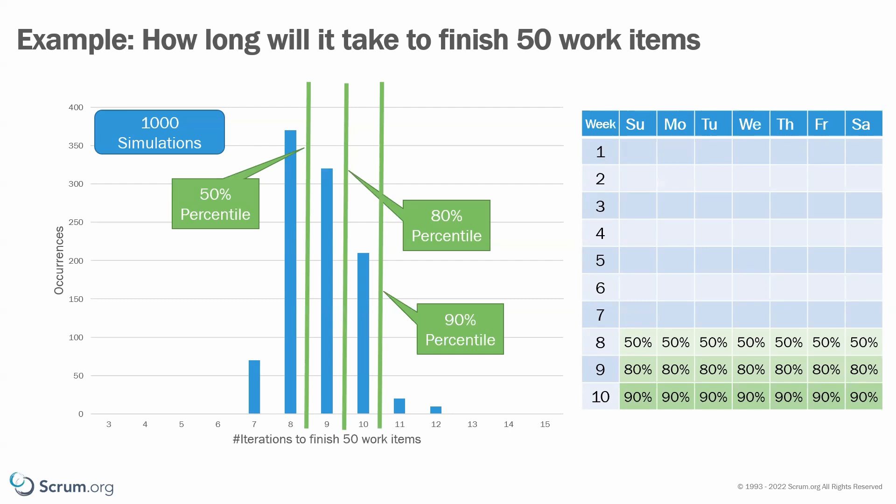This is because in this chart, the highest delivery performance is on the left, where you need less time to complete an amount of items. On the other chart, we had the number of items on the x-axis, so the higher delivery performance is on the right, where we complete more items in the same time period.